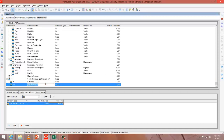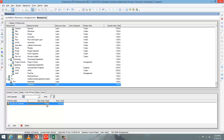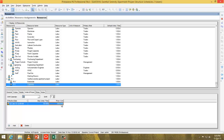Then create another resource — it's carpenter. Go to maximum units per time, change it to 60 because my company can supply a maximum of 60 carpenters per day. And the price of each carpenter is $40 per day.